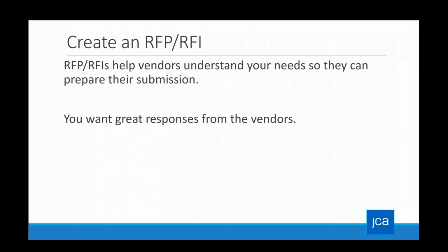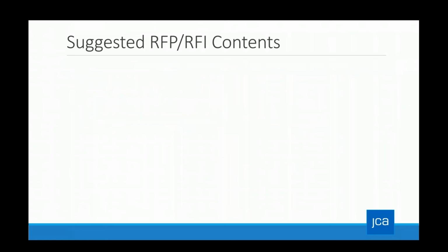So what should you include in your RFP? Well, let's walk through a standard document layout. You could include a section for an introduction to provide background for the selection scope and process. Also, contractual status. This section would state conditions for vendor submissions and rights or non-obligations of your organization. For example, just because you put out an RFP or RFI doesn't mean you have to choose anything. Include a section for vendor process and evaluation criteria. This will describe your organization's selection process and discuss how you will make your decision.